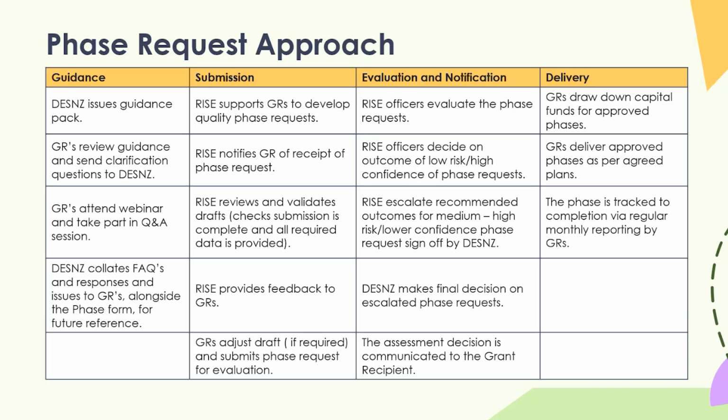Your DSM will do an initial review and evaluation of that. If there are any errors, it will get returned to you with some notes in terms of what needs to be improved. If not, it will get escalated up the chain and approved, either by a member of my team, or, depending on whether there are any elements of risk that we've identified, particularly regarding breaking cost cap rules.